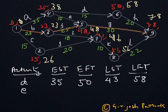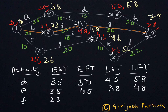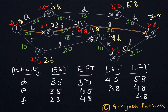For activity E: it also starts at node 4 so the Earliest Start Time is 35. Adding the activity time of 10 days gives an Earliest Finish Time of 45. The Latest Finish Time from the ending node is 48, and 48 minus 10 gives a Latest Start Time of 38. For activity F: it starts at node 3 with earliest time 23, so Earliest Start Time is 23. Adding 25 days gives Earliest Finish Time of 48. The Latest Finish Time is also 48, and 48 minus 25 gives Latest Start Time of 23.